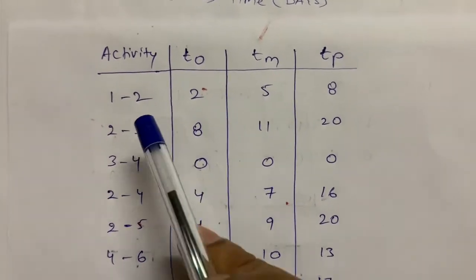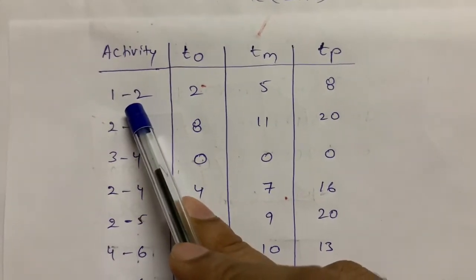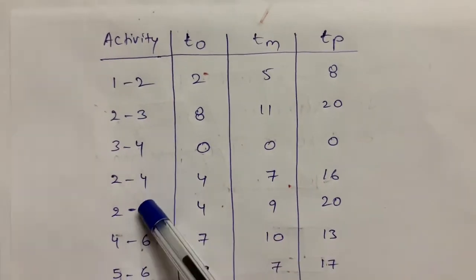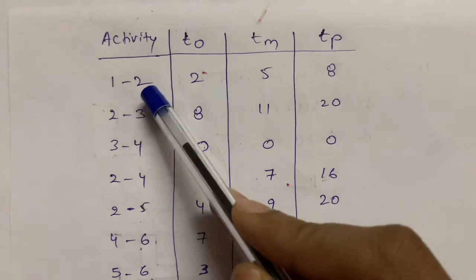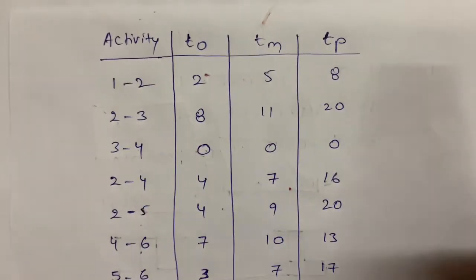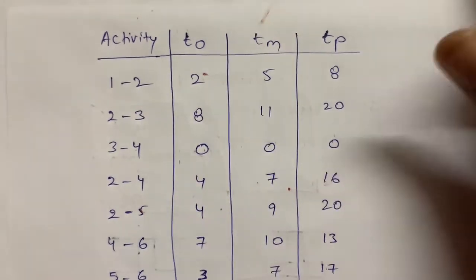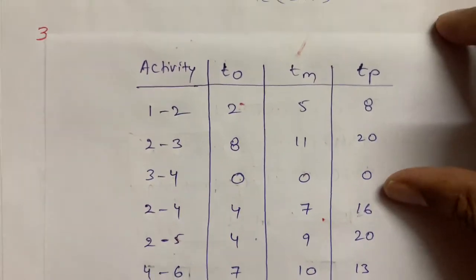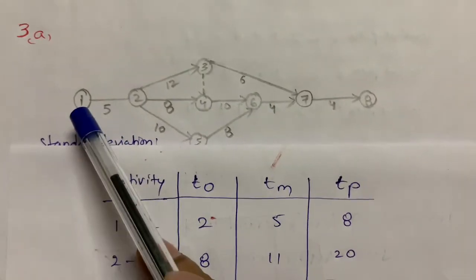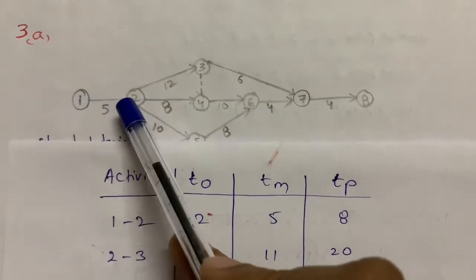First one is 1 to 2, which is one activity. After completion of this 1 to 2 activity, there are 3 activities parallelly starting: 2 to 3, 2 to 4, and 2 to 5. First we need to plot 1 to 2. In a network diagram, there are activities and events. These circles are called events and these arrow marks are called activities.